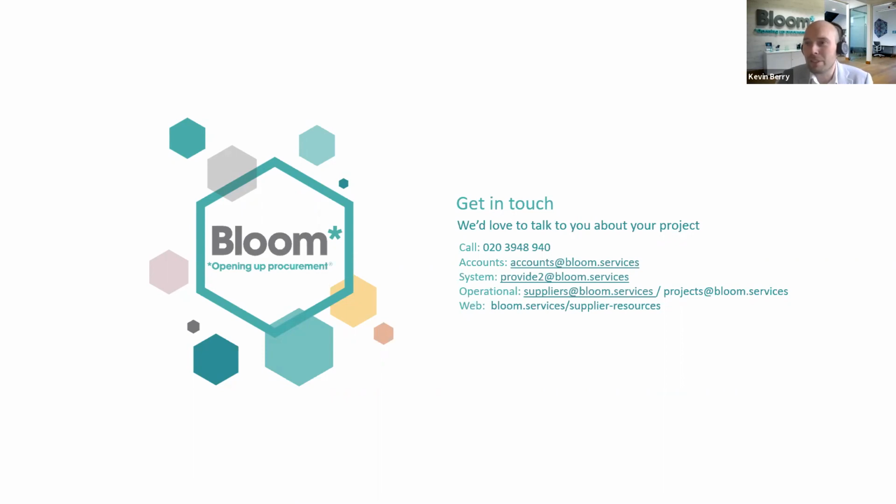Just to cover off a question for Rachel that came in just at the end of that first session, to clarify the payment terms that we mentioned before. Our standard term with suppliers is either 30 days from the point of service delivery plan approval, or 14 days on Bloom receiving funds from the buying authority. And the term is whichever is later of the two. So generally speaking, 30 days is the longest you wait. Hopefully that clarifies things, but if not, please get in touch. As I say, it's 30 days from approval or 14 days after Bloom receives funds from the buying authority, whichever is the later of the two.